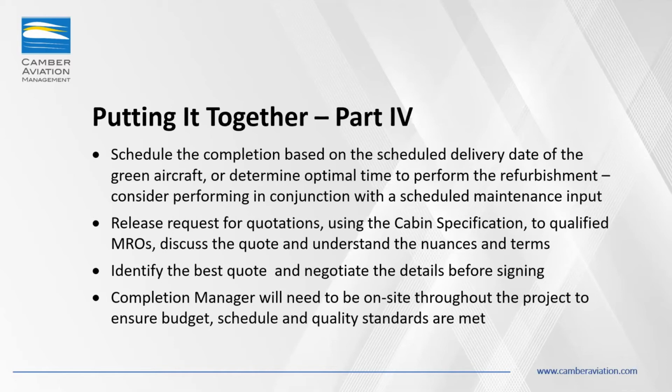If, on the other hand, you have a very relaxed or vague specification, the completion center is going to be forced to put an extra margin, an extra cost on top of that to cover for eventualities. That's something we don't want to do. We want to make sure that we're taking what the client wants and we put it into the aircraft. So we write an exact specification, we negotiate hard and fairly with the completion center under the understanding that if the client, as we're moving along, decides to change something, perhaps a fabric, perhaps a position of a seat, that will be related to a change order, and that change order may cost and may affect the schedule of the program. So as long as we do that, we start getting rid of all of the potential for strife between an owner and the completion center. Everyone knows what the owner wants, and the completion center knows what they're going to be delivering on time and on what budget.